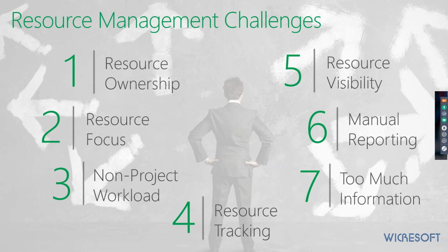Many project managers make the mistake of assigning resources as if they're 100% allocated to projects, or every task that they put them on, they put them in as 100%. But as we all know, a lot of times that's not often the case. Resources oftentimes have other work outside those projects, non-project work, that needs to get done.